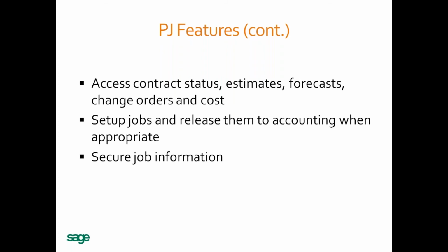And then as far as working within the software after the setup, you're going to be able to manage your contracts. So these would be the contracts that you set up in the CN module, subcontracts, purchase orders, again with the commitment setup, any change requests that come through for that project, and then you can turn those directly into a change order, and then release them over to accounting, which means send them over to the job cost module so that you can run reports on it from there.